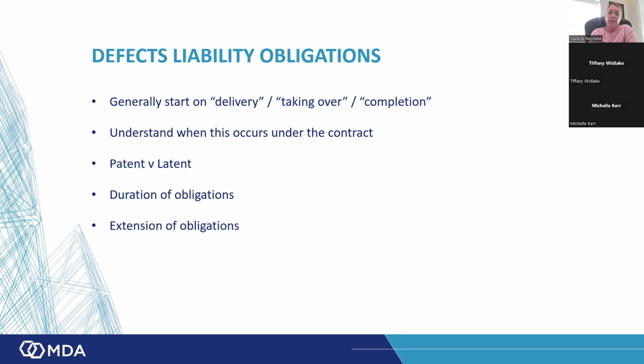But a defect has a specific application in the contract, and it must be failing to comply with the specification, for example. So even though a defects notice has been issued by the employer for the contractor to remedy the defect, the contractor would always have a defense to that claim to say it is not a defect, the works were executed in accordance with the specification, therefore we are not remedying at our cost. So there are all those remedies available to the contractor.